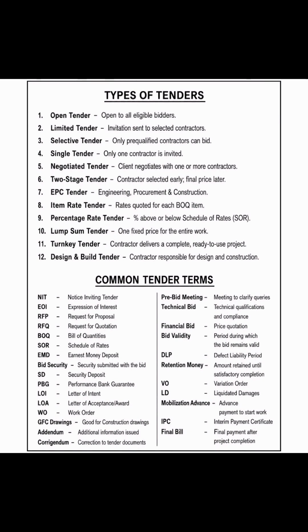Then we also have your BOQ, that is your bill of quantities. For your bill of quantities, you do your market surveys. Then after your market surveys, you use the prices that you have there and bring them into your BOQ, so that your prices will be up to date.